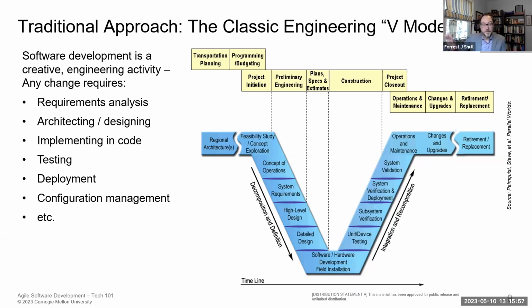And then you walk back up the right side of the V, where I start to first test very thoroughly and extravagantly the individual units, those components, and then start to integrate at higher and higher levels, so that by the time I get to the top right of the V, what I'm evaluating is how well it really responds to those very high-level operational concepts I had at the beginning. And so in a nutshell, those are many of the different technical activities that go into developing software.